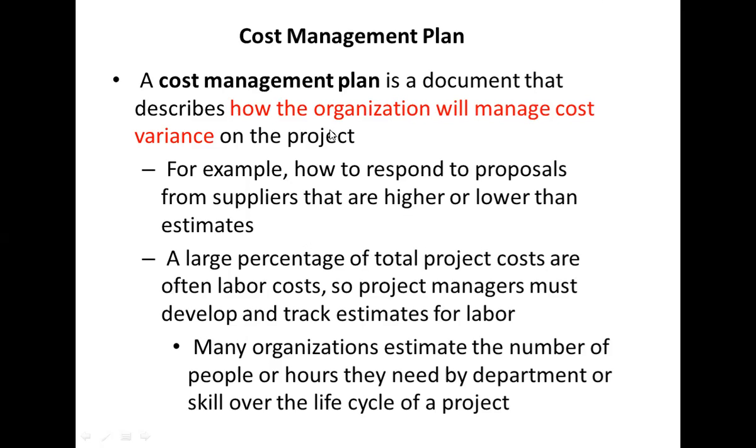When you're developing this cost management plan, you have to take into account some details, like which activities take costs in large amounts. A large cost is normally taken by the labor costs. So you have to keep in mind, when monitoring cost variance, specifically those processes which take a higher amount of cost.